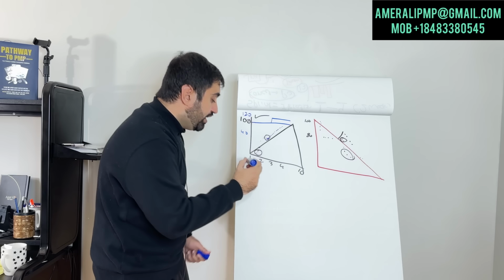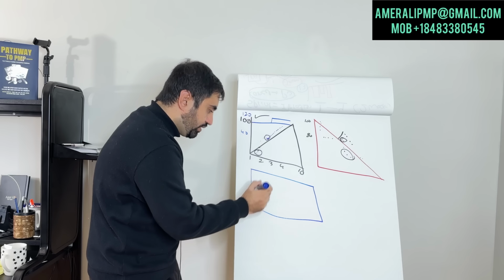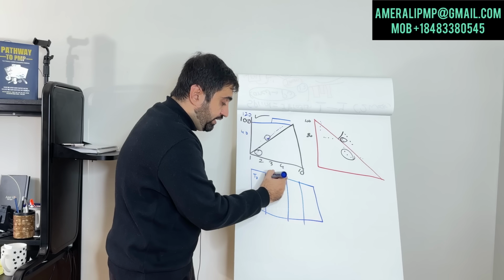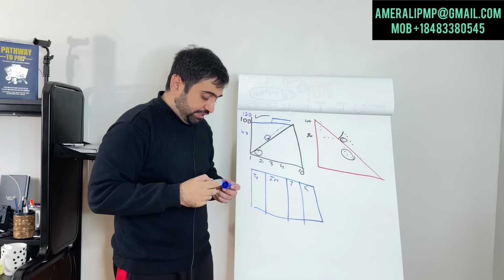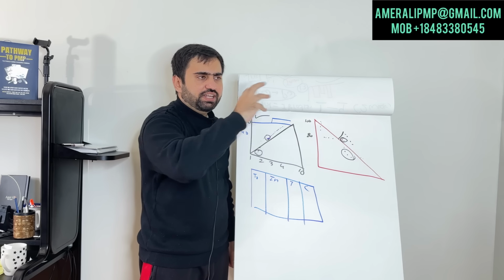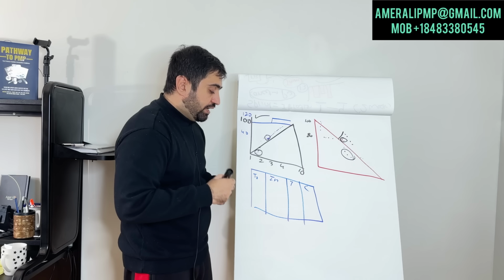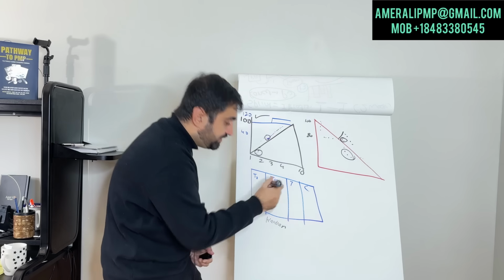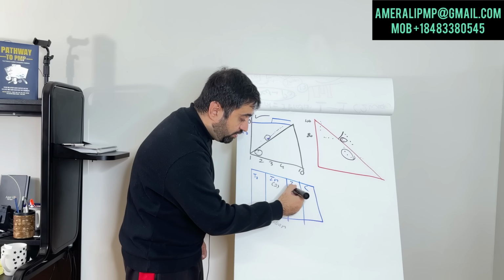Okay, then we have task board that simply shows you the progress: to do, in progress, testing, completed. It shows you the progress in the entire project. You use task board for every single thing that is working into that. There's an advanced task board that we use that is called Kanban board. It is same but with one difference. It has limit of progress.